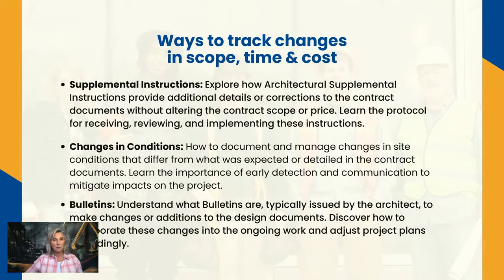So those are both different than supplement instructions. Supplement instructions are going to come from an architect. They may also be called an ASI, a CIC, change in contract. So there's a number of different acronyms that might be used for this particular tool that the architect uses to provide additional information that they had hoped would make it into the contract documents. Somehow it did not. They can see that it's necessary in order to move the project forward, and or there are parts in that architectural supplement instruction that are supplementing work that is in the contract and additional modifications that have been requested by the owner.